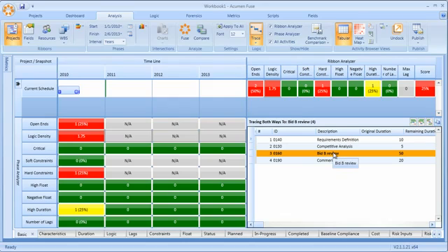I can see the activities leading into bidder B review, I can see the activities actually leaving or stemming from bidder B review, and it's interesting that in terms of driving logic, my driving logic actually stops after commercial review. Now, additionally, the metrics that we're seeing now only pertain to the driving logic through this bidder B review.